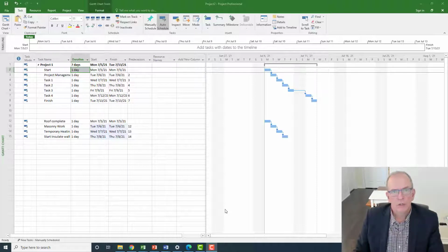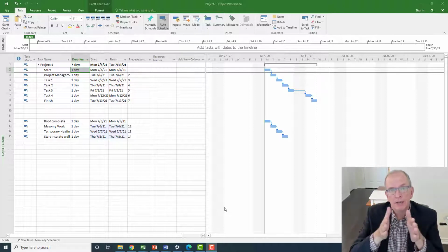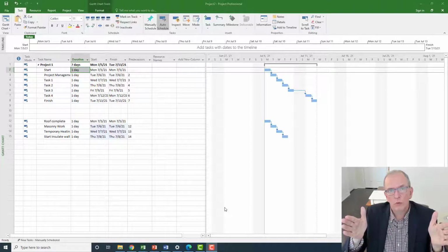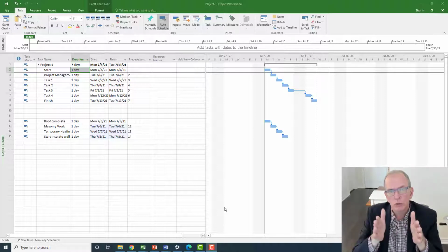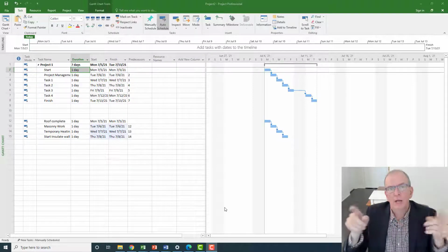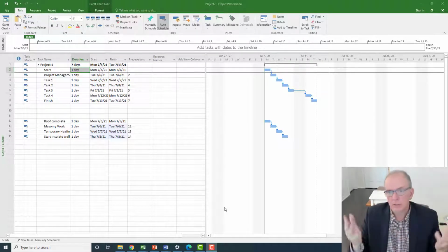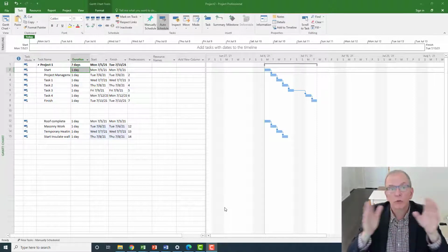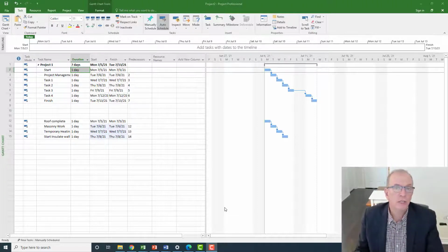Today, we are going to be looking at a hammock activity. A hammock activity is an activity that can adjust outward or inward, longer or shorter, based on a driver activity that is pushing it. It may be a multitude of driver activities, as you'll see, and that way you don't have to remember to change it or to adjust it.